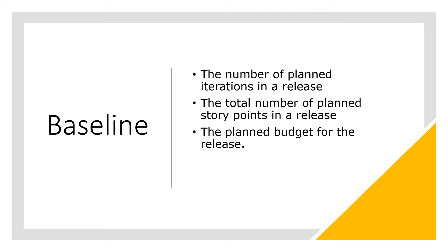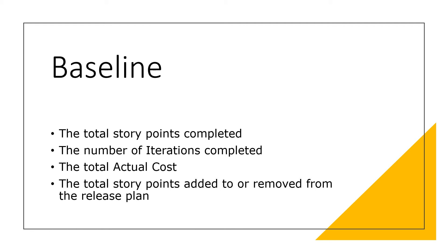Let's see what our baseline is. We are using three data points to establish the initial baseline: the number of planned iterations in a release, the total number of planned story points in a release, and the planned budget for the release. In order to calculate the EVM agile metrics, four measurements are needed: the total story points completed, the number of iterations completed, the total actual cost, and the total story points added or removed from the release plan.